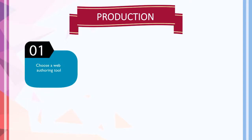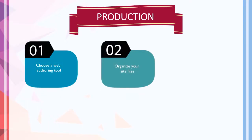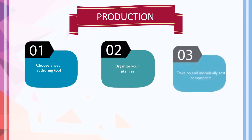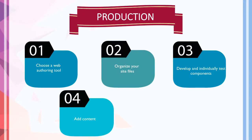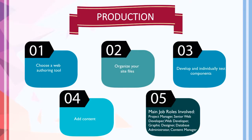In the production stage, the steps are: choose a web authoring tool, organize your site files, develop and individually test certain components to be incorporated into the website, and add the required content. The job roles involved are project manager, senior web developer, web developer, graphic designer, database administrator, and content manager.